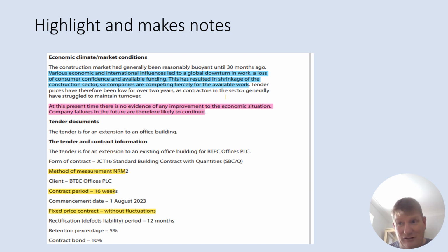So you're going to lose about £300,000, £400,000 if you go over by a month. That's a lot of money. That's your profit gone, and you're making a loss straight away. You're going to be adding to the £500,000 loss that you made the previous year, so it's going to eat into all your profits, I'm afraid. So that's a big risk there.